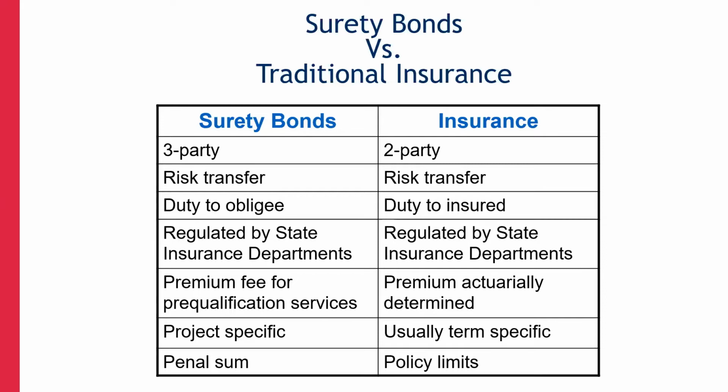Surety bonds are a little different, as many of you may know already. You are essentially being pre-qualified, and you're paying a fee for that. There aren't necessarily charges for bid bonds per se, but it's quite a process and involves financial statements, tax returns, resumes, and looking at contracts to make sure that the provisions in the contracts are suitable, reasonable, and not too terribly onerous for small contractors to engage in.